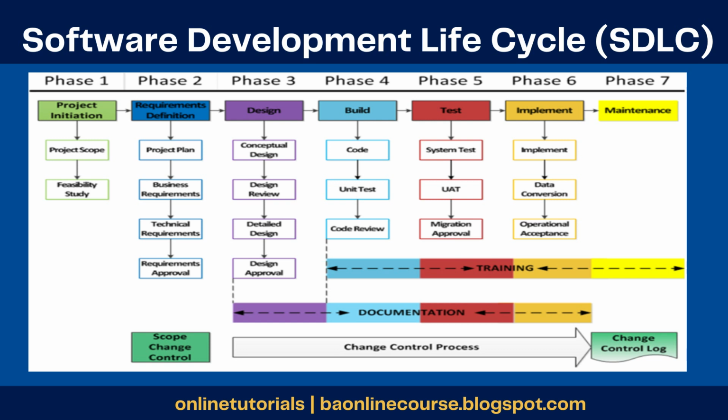Right. Good. So basically, if you have a long project, where the scope is so large that it might take some 2-3 years, you break it down into pieces and then work in phases. Each phase would deliver some functionality, and the advantage is that you'll have something to use much earlier, maybe at the end of 6 months or 4 months or so. So that's the advantage of an iterative model. Okay.